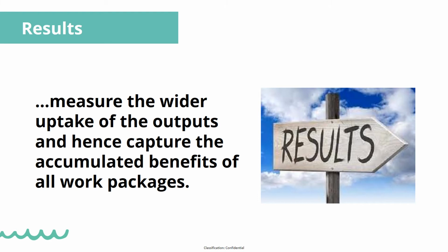The result indicators are predefined. We are operating with a clear set of output and result indicators. Hence, each result indicator is linked to an output indicator. In comparison to output indicators, result indicators are defined on project level, not on work package level. We have talked about 2 plus 1 extra output indicator. Hence, we are talking about 3 result indicators that you have to take into account when planning your projects.